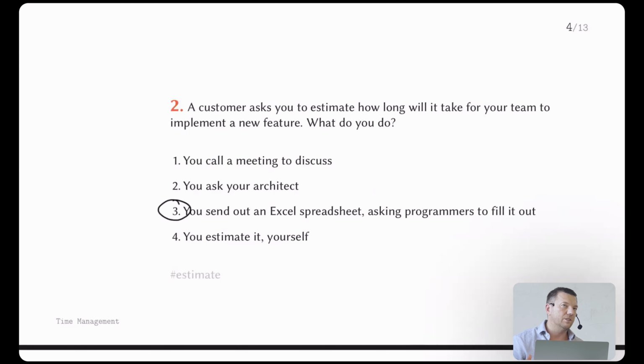So all together they discuss. In my opinion, this may be a good approach, but only after you collect the numbers. People should make estimates without talking to other people. They need to estimate in isolation, to put their own thoughts there, not listen to others. So taking everybody in the group and discussing in the group is not, in my opinion, a good approach in this particular very sensitive area. People need to think by themselves.